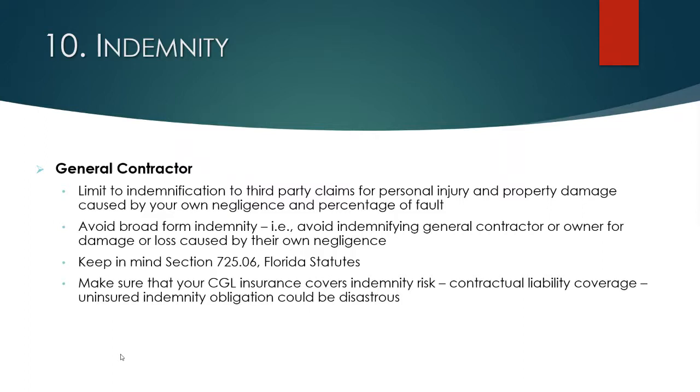That cap has to bear a reasonable commercial relationship to the contract work. And the cap has to be part of the bid documents and specifications. But if the indemnification provision meets those requirements, you can be, as a subcontractor, required to indemnify an indemnified party for their own negligence. So again, you really want to focus on keeping that out.